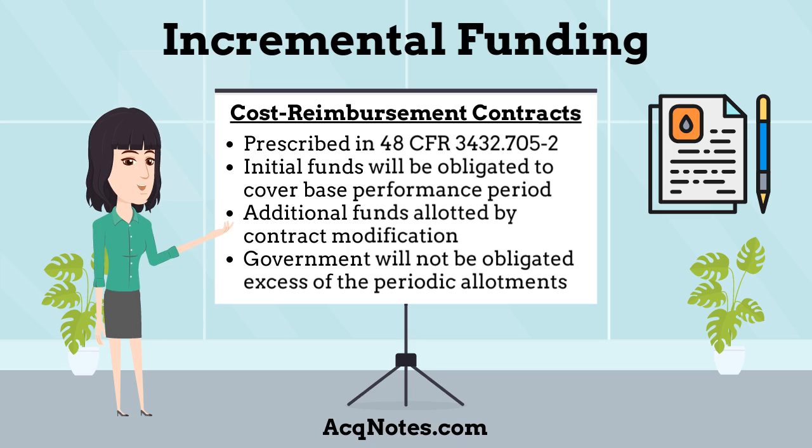The government will not be obligated to reimburse the contractor for costs incurred in excess of the periodic allotments, nor will the contractor be obligated to perform in excess of the amount allotted.